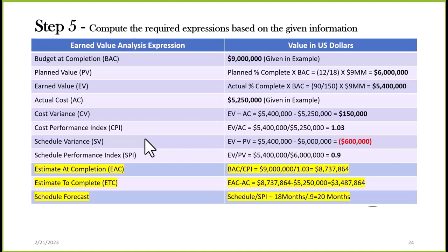A leading indicator says that I will check the amount of money that I'm spending, my schedule performance, periodically. How often? Let me say this. If you're spending a lot of money, you better be doing it quite often. You may be doing it weekly in some cases. You may be doing it monthly in some cases. But you want to make sure that you gauge this and that you're completing this periodically throughout the project.